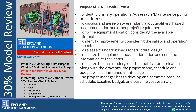To discuss and agree on overall plant layout, qualifying hazard recommendations, and other project requirements — most of the time before 30% model review, the hazard study is already completed. So we have a list of hazards identified during hazard sessions, and those should be discussed with respect to overall plot plan, equipment locations, and plant layouts, along with other project requirements. Once we do this, we can see how risks are taken care of, how hazards can be minimized, and how the recommendations can be implemented.